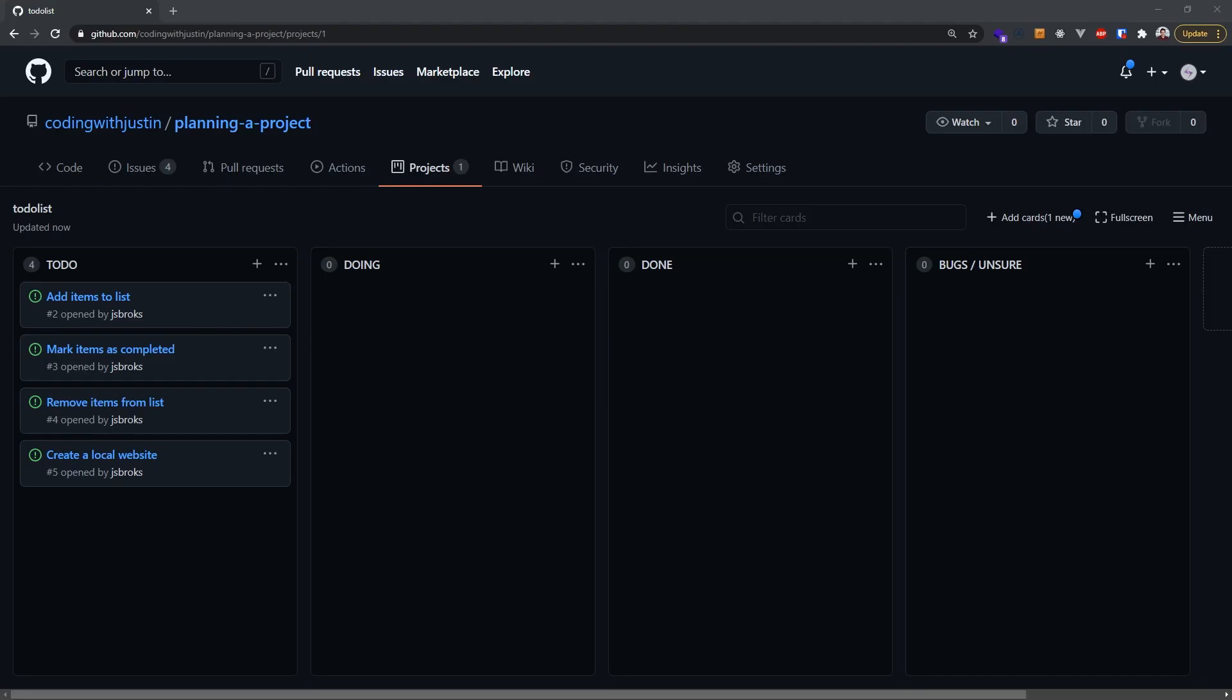I'll break our project down into smaller issues based on what we talked about. The biggest benefit of the cards is that they simplify what we have to do. But we are not done yet. Once we have the high-level cards, we can break these components down again into smaller tasks.